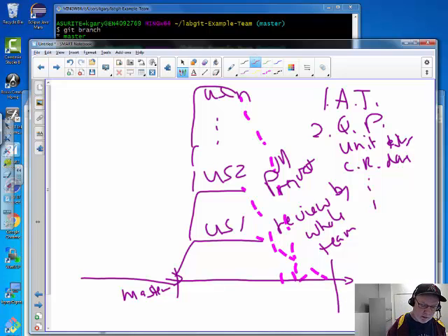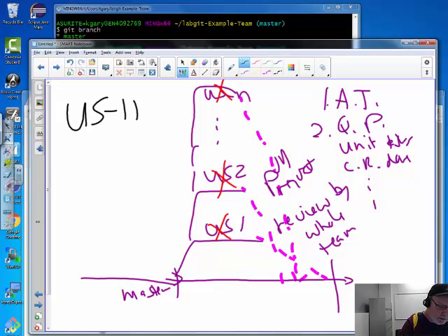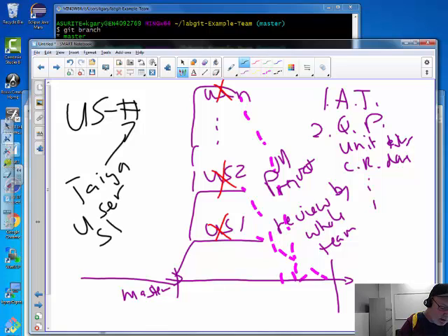And again, when the pull requests have been accepted and the changes are on master, now you can start knocking things out and getting rid of them. You don't need those branches hanging around, so you don't clutter and accidentally work on the wrong space. Okay. We'd really like you to adhere to the pattern of naming these branches US dash the number, where that number is your Taiga user story, not the task. We're not branching on task. It's the user story number.